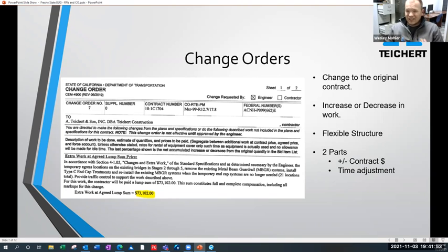And it'll be an invoice, right? You submit your backup with change orders. So if it's a T&M change order, well, then you're going to send in all the hours you worked that were agreed upon with the owner and also all the materials you purchased for it. So you'll package that all together and submit it with the change order and get paid for it.